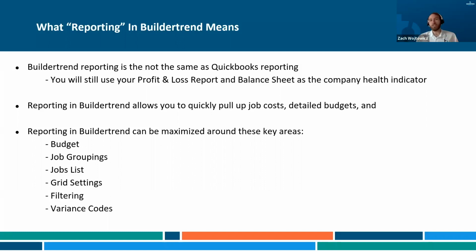So that budget tab is the most commonly looked at page for people that are using the financials, but a lot of people don't actually take the time to sit and read how it's going on. Exactly. At the bottom right-hand corner, it gives you a nice little summary table that says job running total. That means your total contract plus change orders plus any adjustments, the final number that your customer is going to pay. Price per square foot.